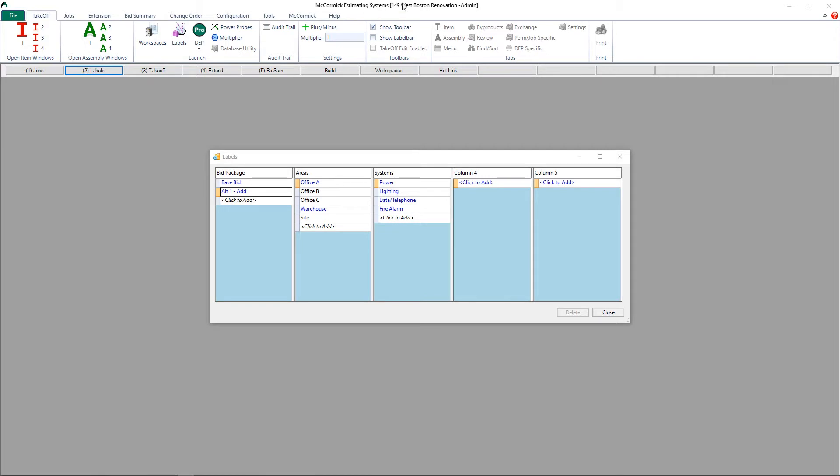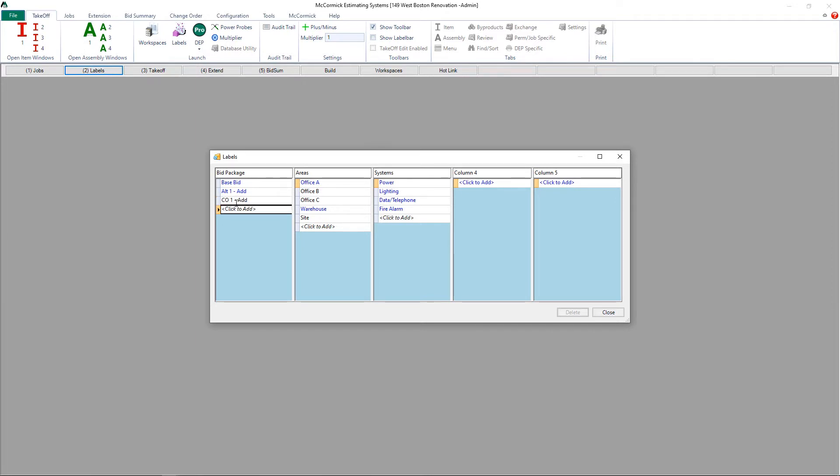To start, you'll want to open up the job folder and go straight to Step 2, Labels. I've designated the first column of my labels for my bid package, so where it says Click to Add, I can type in the label of my change order. I'll go ahead and do a Change Order 1 Add and a Change Order 2 Deduct.